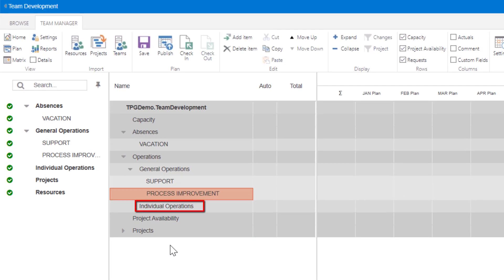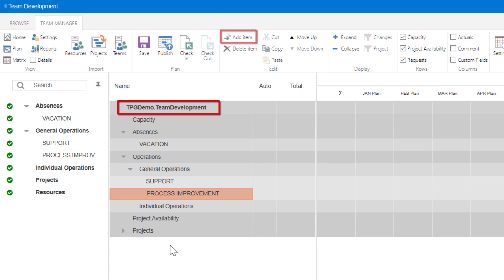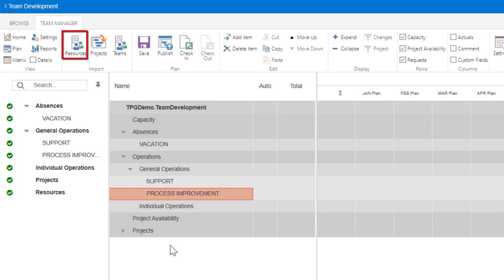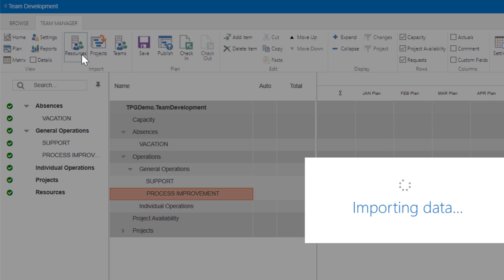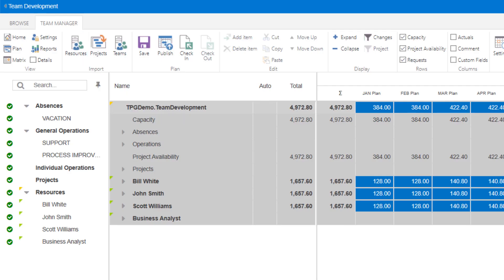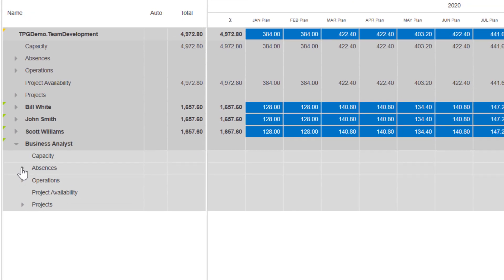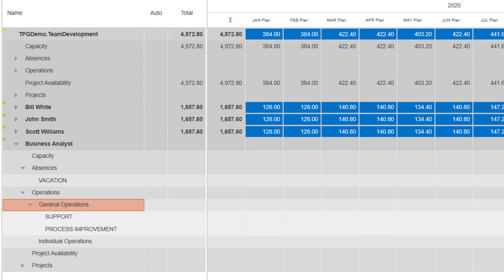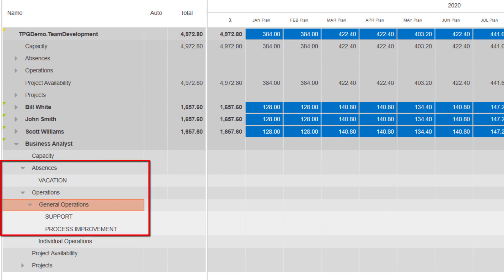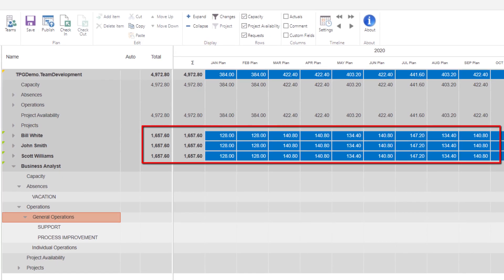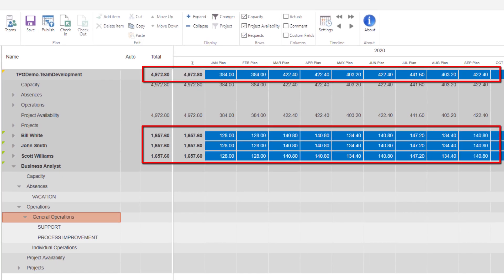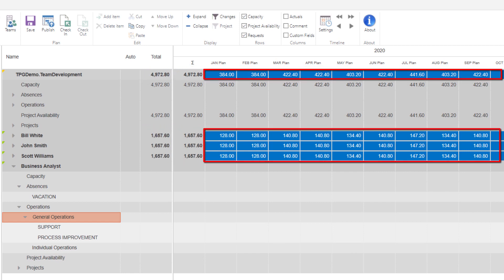Note you can add individual operations to each resource individually. To add resources manually, select the Resource row and select Add Item. But if you have Microsoft PPM, you simply click the Resource icon, which will import the resources matching your team's Resource Breakdown Structure, and the resources will be populated below the Projects row. Expanding the resource details, you will notice that the structure of Absence and Operations detail we created is now applied. In addition, the Capacity has also been populated and rolls up to the Summary row.